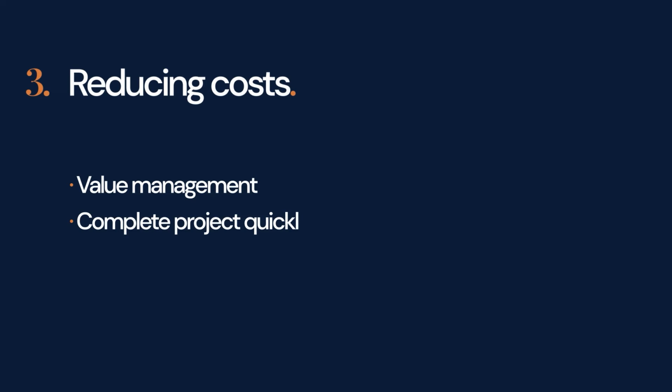The second biggest expense you'll face is holding costs, which is why it's important to complete the project as quickly as possible. Completing the project faster reduces the amount of holding costs that you have to pay. Loan repayments, council rates, land tax, insurance, and utility charges all chip away at the profit within a project.